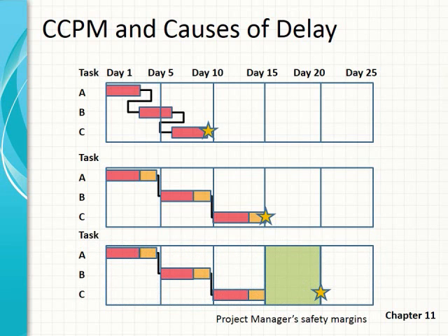After the individuals are done, well, heck, it's my turn as the project manager to add a safety buffer to the overall project, and now I'll go to my manager and say, hey, there you go. I think we'll be done these 3 activities in 20 days. So where we go from that original estimate of 9, we can easily double the time that we're allocating to complete this set of activities.